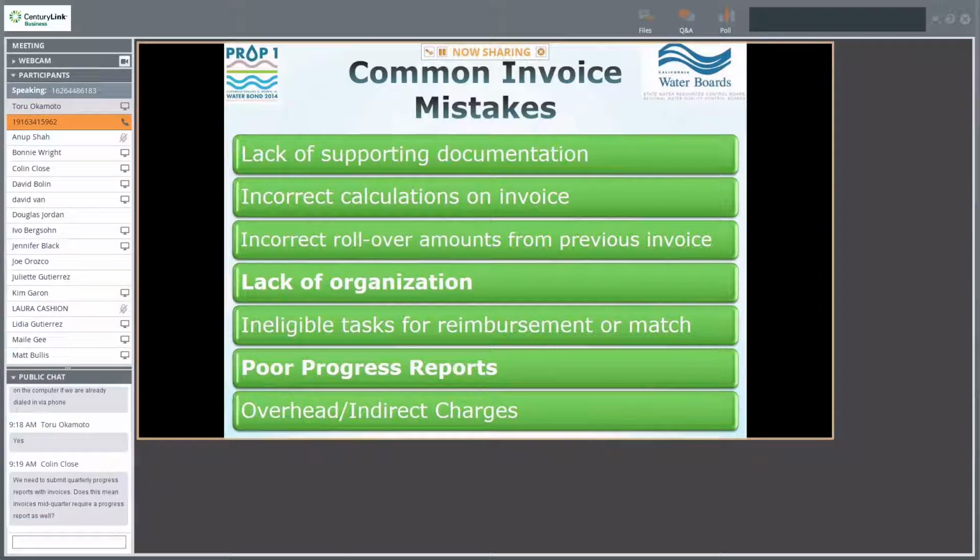Well, just to clarify, you're saying that the contractors that we use, we can't have any line items that is overhead? Correct. So what you could do, if you anticipate there's going to be overhead, you could just roll that in to a rate. It's just that we don't like to see those. If it's on the invoice, we won't be able to pay if it says overhead. Got it. Okay. But you can roll those into the rate for your subcontractor.